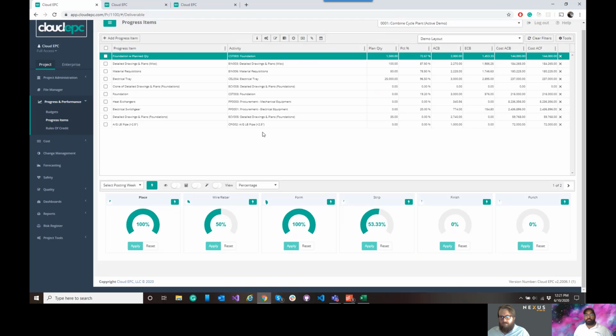We could have stopped at this point and effectively have a full earned value management system. We have our budgeted values. I hadn't shown it yet, but we can spread those out over time. We can do CPI and SPI. We can earn our value. We can look at what we've actually spent.